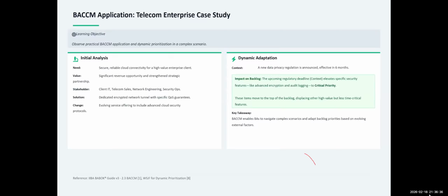So that's the definition of readiness, to say that if I pick an item and I want to say, okay, and this happens most times when you're doing your backlog refinement, right? Or grooming, as the case may be. You look at it to say, okay, which of the items can we pick so that we can take it into the next sprint to start working on it? So that's the definition of ready. If the item does not pass this checklist, if it's not testable, it's not small, you can't estimate how long it will take to deliver it, then it's not ready, right? So that's the definition of readiness.